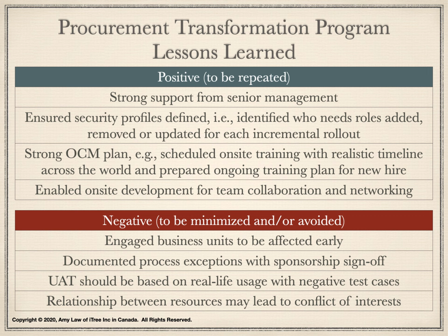Last but not least, we should have a clear understanding of the relationship between resources. In some cases, we could end up with a conflict of interest. Two resources from the vendor were brothers. One of the brothers was capable, whereas the other brother was not. Yet the vendor made it clear that both brothers must be hired as a team. A better way to improve this situation is to select a vendor who can offer multiple resources for client selection. This can be a challenge because the vendor usually provides resources without letting the client pick the specific resources.